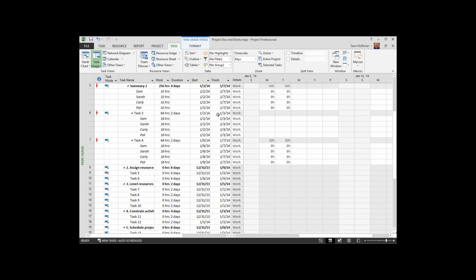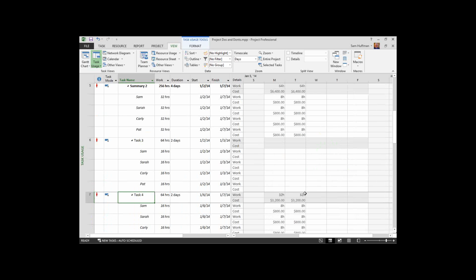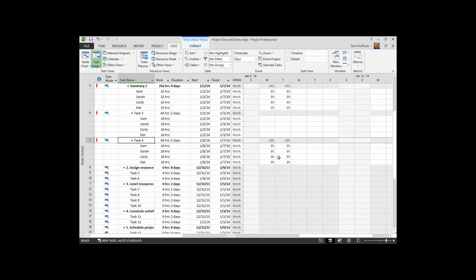That's not a perfect solution for you, but you're not going to have multiple stop and resume fields. You're going to have the initial one and then some type of view such as this indicating where that work begins and ends. So you can see the tasks, and under the task is shown the assignments, the amount of effort, and then the roll-up at the task level. Likewise, if you're trying to see what those costs are, you would right-click in the usage view and include the cost factor for the resource. So you can format this to give you the amount of detail and granularity that you want.